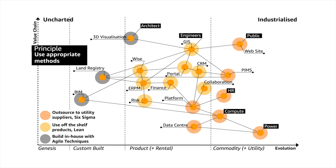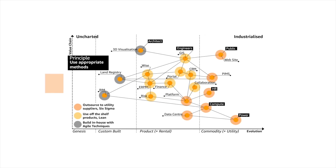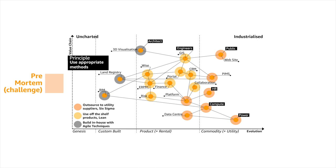The use of appropriate methods is a pattern. These patterns come from the fact that we use maps pre-mortem and post-mortem. Before we start something, we create a map and challenge what we're going to do — that's the pre-mortem part. Then we go build it, and afterwards we use the map to look at what happened — that's the post-mortem learning. And it's through that post-mortem learning that we discover patterns.